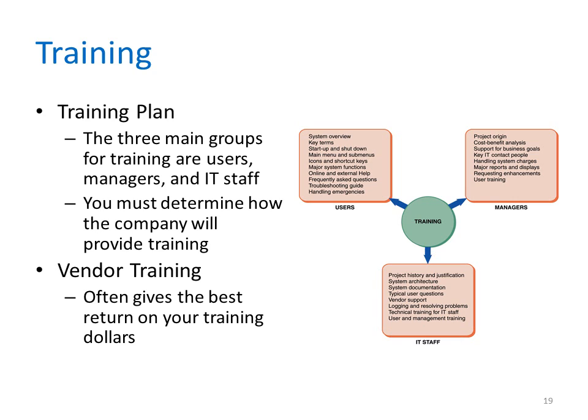When you implement the system, it's essential to provide the right training for the right people at the right time. The first step is to identify who should receive training and what training is needed. A manager, for example, does not need to understand every submenu or feature, but he or she does need a system overview to ensure that users are being trained properly and are using the system correctly. Similarly, users need to know how to perform their day-to-day functions, but they don't need to know how the company allocates system operational charges among user departments.